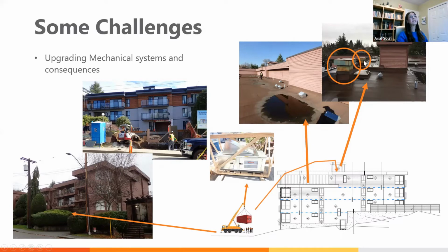The cost of replacing this, just the units by themselves, I think it was around 25 grand each, which is about 50 grand. But just the cost of putting them up on the roof was around 45 grand, I guess, which was inevitable. But these are some of the challenges that we had to deal with, the cost during the constructions.